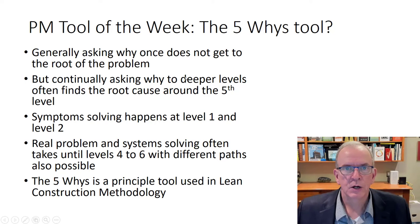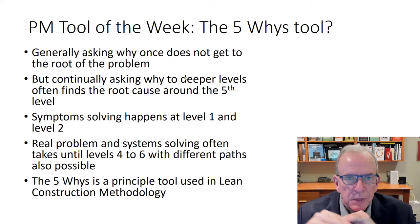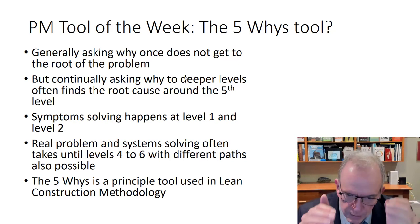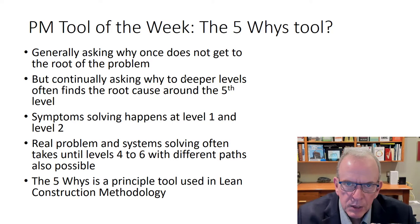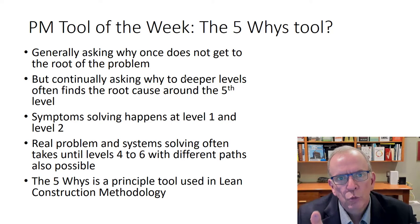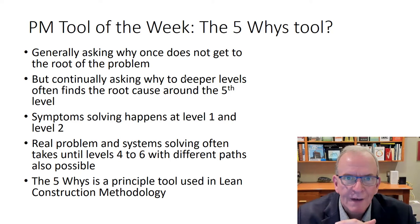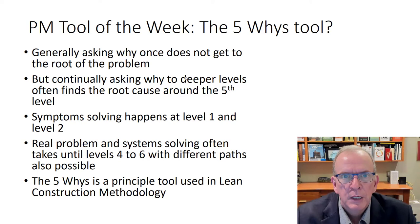The five whys tool means you don't stop at the first why — you keep asking more questions on the topic. If you ask someone why something happened and they explain, they probably didn't go deep enough. You ask again — 'But why did that happen?' — and they go deeper. Keep going until you reach the root cause. It could take three whys or seven; it's usually around five — that's why they call it the five whys. The point is to keep digging until you're at the source, because if you stop at the first one, you're treating the symptoms, not the disease.